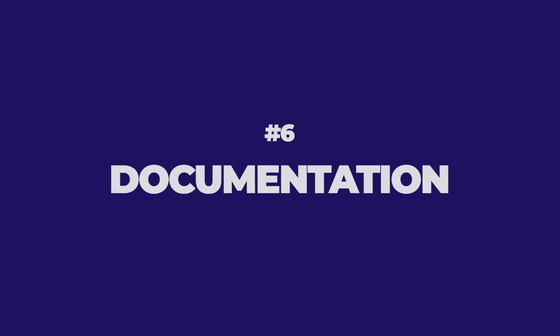And then number 6, documentation. This is key. I always say, if there's a change, if there's a delay, if there's a problem, if there's an impact, it's got to be on the daily report, and it's got to be discussed in the OAC and put in the meeting minutes. I want conversations well documented in the meeting minutes so that we have a historical record that these things were discussed.